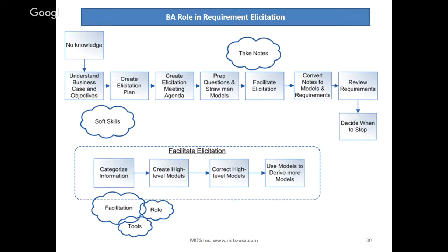All right, so the other key thing with the plan is it's got dates. It's not a plan until it has dates. I get a lot of emails, and I was at Monroe, it's like, would you do this? Or we'll do this. It's like commitments or asking for a commitment. And I look at that and I don't see a date on there, so low priority.